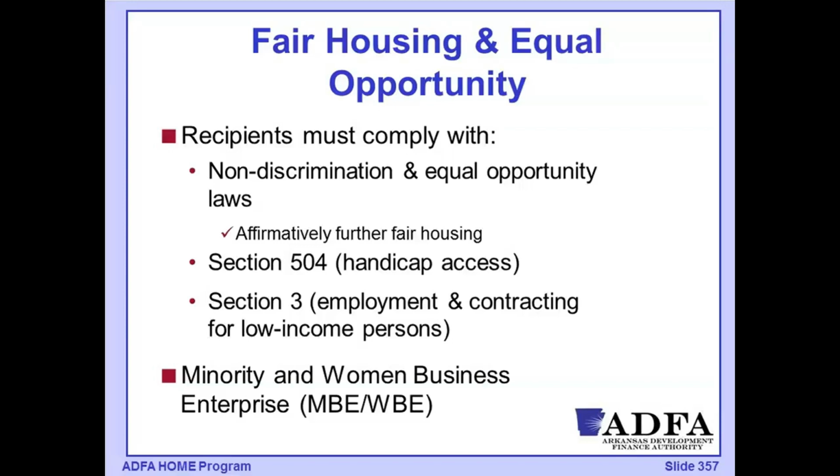It also would be triggered for rehabilitation, where our rehabilitation cost is at least 75% or more of the replacement value for that property. So when we're doing really significant rehabilitation, then we're going to have some extra requirements to make sure that we make some units within that structure meet our handicap accessibility requirements as part of that.